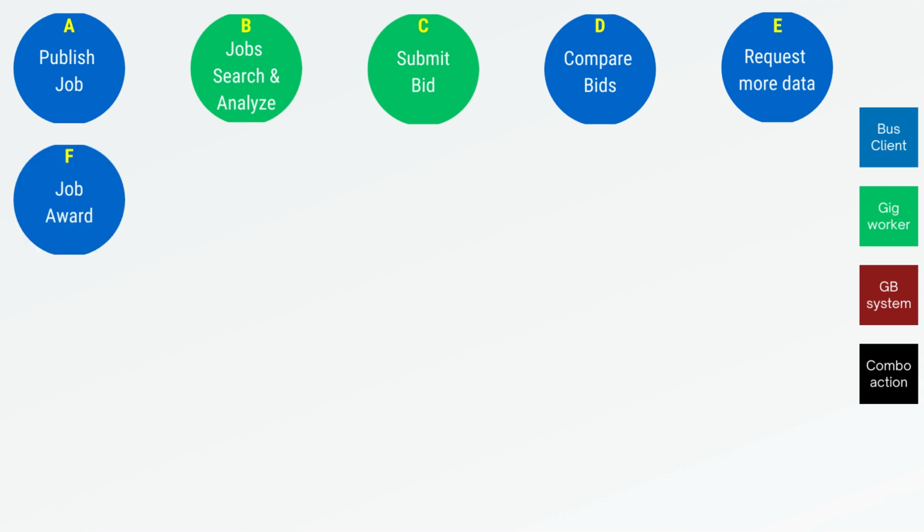The client may then enter into a negotiation with the finalized bidder, and update the contract price, schedule, and any other terms. After the negotiations, the job will be awarded to the winning bidder. The client and the freelancer would then work together to develop a milestones-based delivery and payments plan, so that both parties can become more comfortable with the engagement.